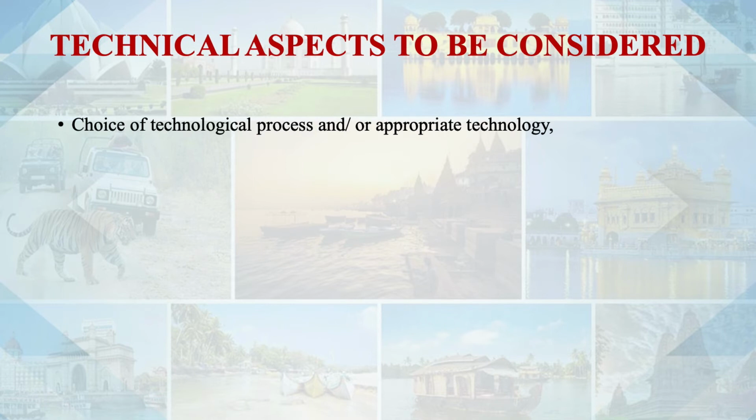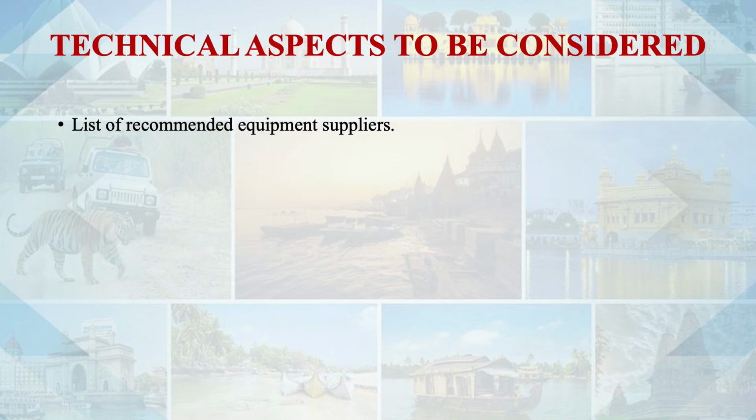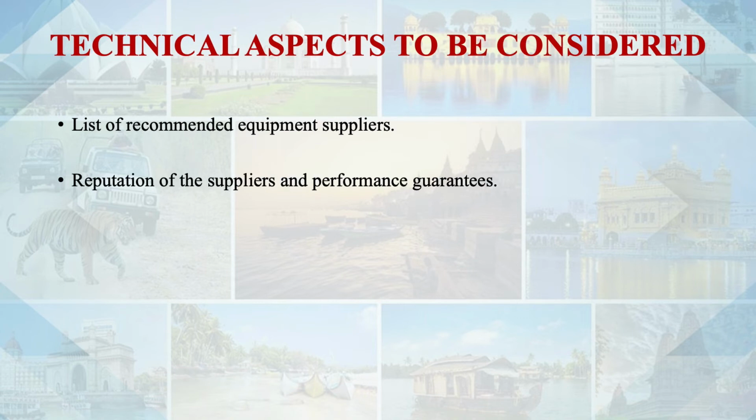Choice of technological process, appropriate technology. Is the technology proven or well tested, or is it new technology which may bring challenges or problems in the near future? Does the technology, process or equipment technically fit with the facility's existing technology? That is very important. Otherwise, the whole new setup needs to be established, and that may create a problem. List of recommended equipment, suppliers, reputation of the supplier, performance guarantees, those are really important points under technical aspect.